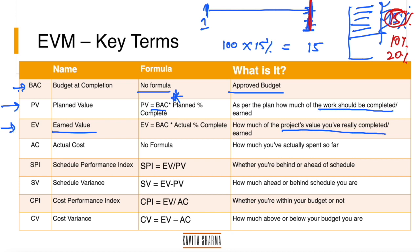EV = BAC × actual percentage complete. For example, if we completed 15%, then EV = $15. While doing this work, the team would be spending money — paying contractors or team members at a per-dollar or per-hour rate.